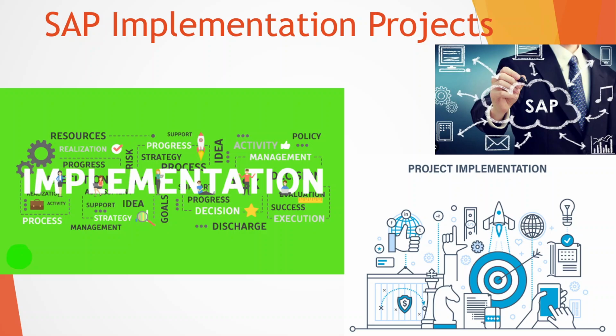Very few people have actually seen it. Most people only write on a piece of paper, but they have never seen how a contract is signed, from the start until the project goes live, and the initial support of anything between 4 to 6 weeks is completed successfully, and then the project is handed over to the support team. Once that is done, only then is the project considered completely over.